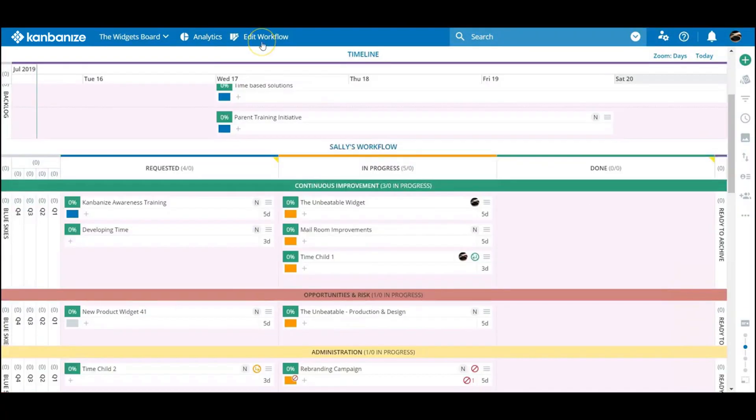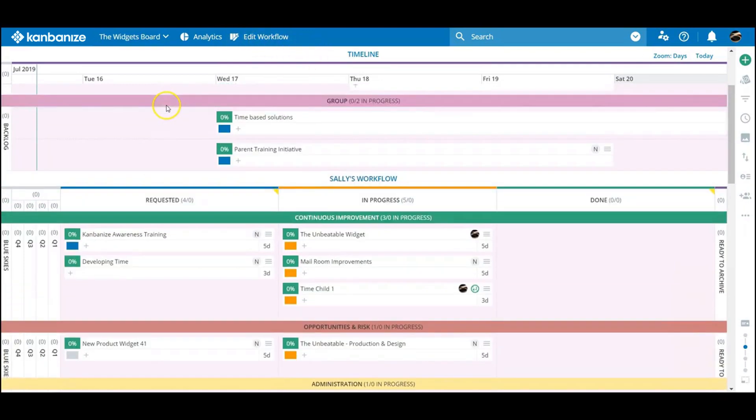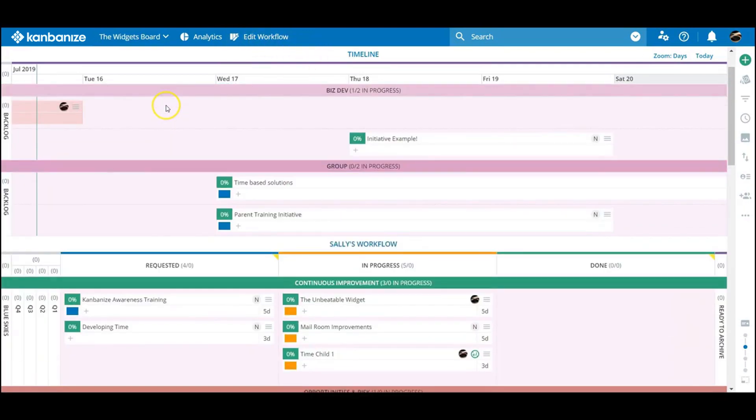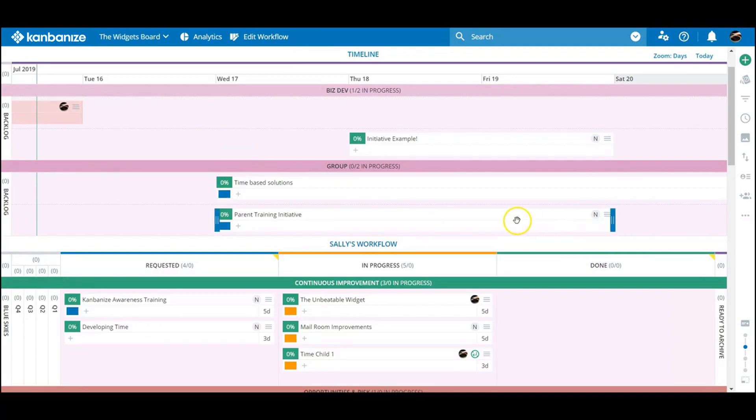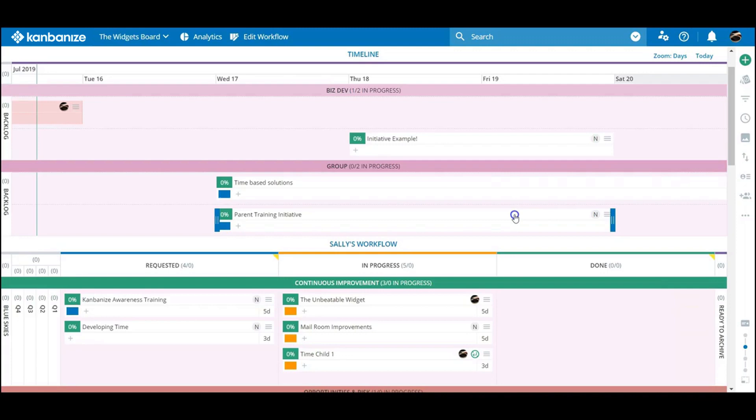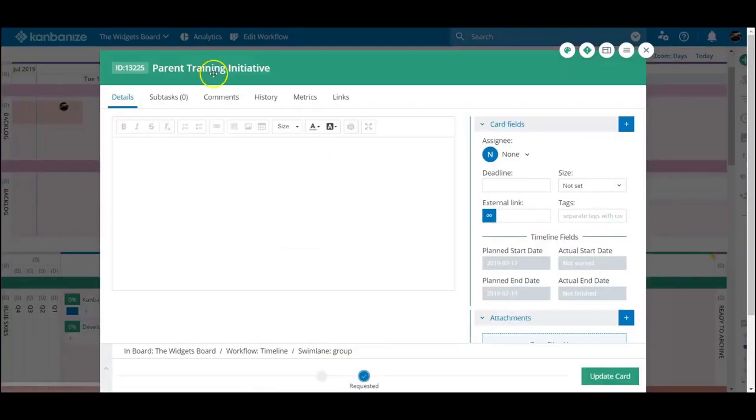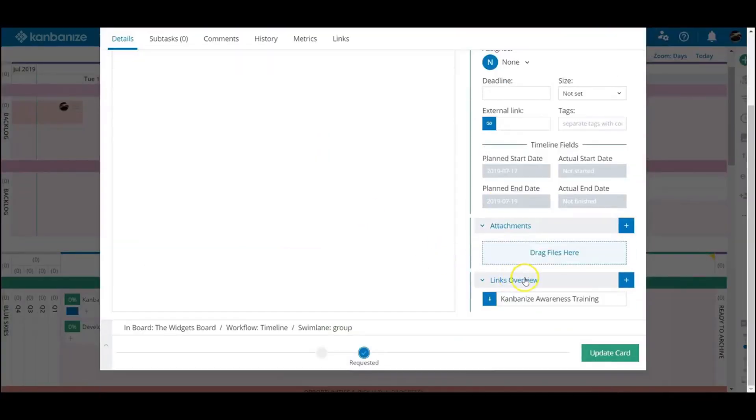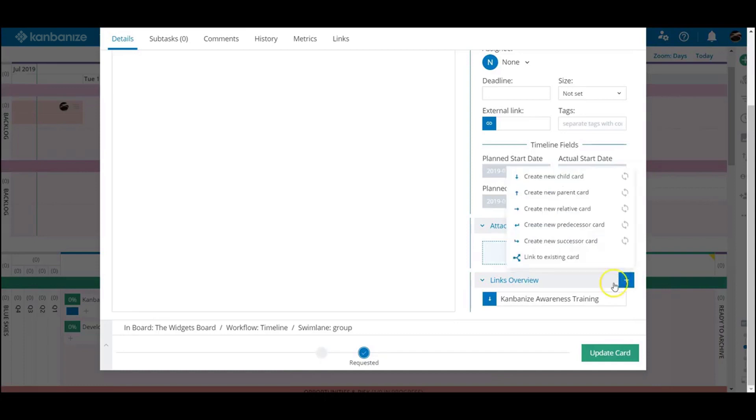As they are time-sensitive to a degree, successor and predecessor relationships take on a new level of importance, as they'll graphically demonstrate how the late completion of the first card effectively reduces the time available for the second to be processed.